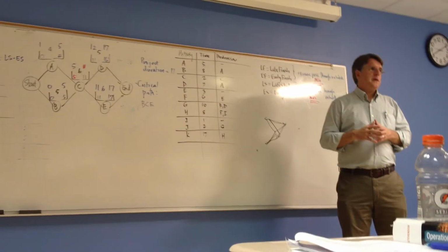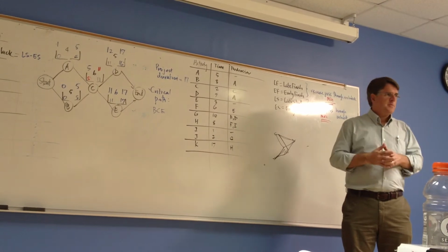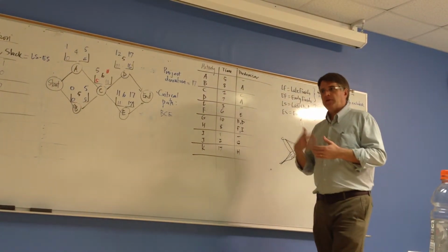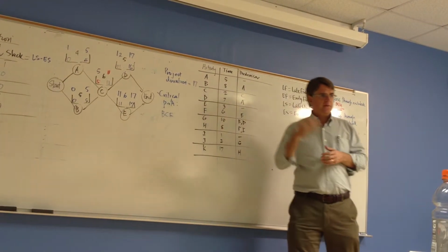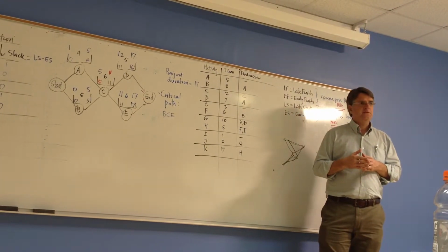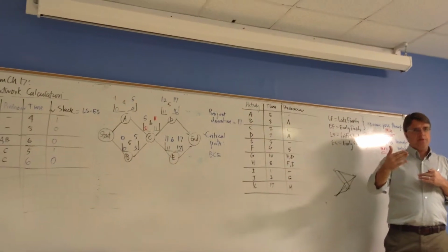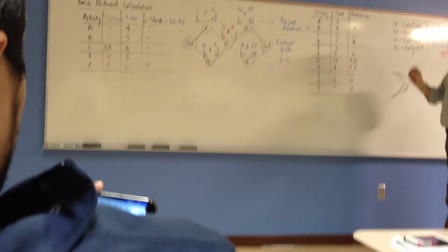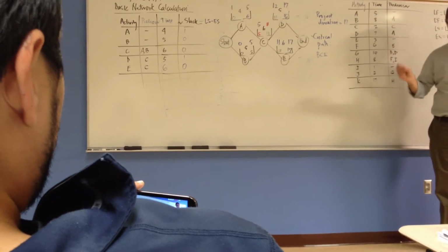And if I'm going to do that many square feet in 2 days, I need to get extra people in. Maybe I'm just a 2 or 3 person operation, and I would have to get buddies in, and I'd have to pay out because I'd have to pull people off other jobs. So the price would go up. So that's the notion of expediting. The idea of crashing is to expedite activities in a project.